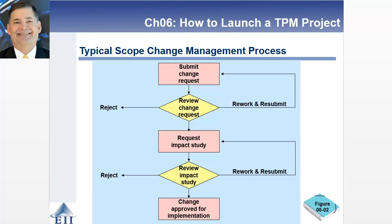The typical scope change management process is: a change, new feature, or fix is requested for a particular project, submitted, and reviewed. It could be rejected, reworked by sending it back to the submitter for additional details, or approved for further study. You can then request an impact study, look at the advantages and disadvantages of the change, and again either reject it, submit it for further definition, or approve it and add it to the project plan.